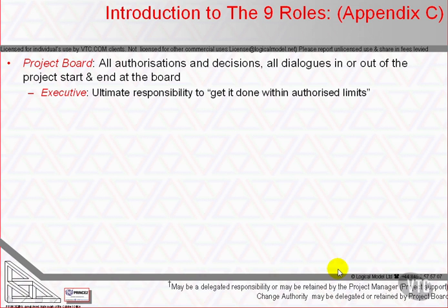Throughout the project the executive is responsible for the business case. The manual says, in bold — perhaps the only time it uses bold — the project board is not a democracy controlled by votes. The executive is the ultimate decision maker and is supported in the decision making by the senior user and senior supplier. There is only one vote on the project board: the executive's.